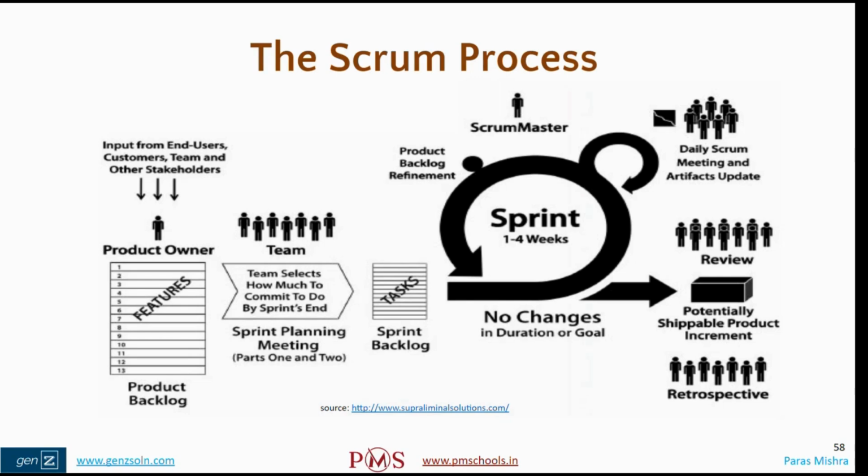Suppose imagine if all these stakeholders start talking to the architect and mason. Do you think the house will ever evolve? And that's why the role of a product owner is very important. What he does, he takes all the input from all the end users, all the stakeholders, all the business users, converts them into features, converts them into epics, converts them into user stories. And we will talk about all these terms which I am using. And he creates the product backlog.